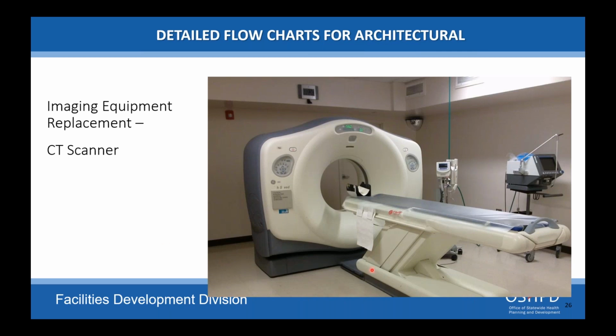So again, this is treated a little differently than a standard equipment replacement, because you have to identify the procedures. Now, if CDPH blesses the procedures, you're fine. If it does move it into a new category, you may have to upgrade the room or relocate the service.